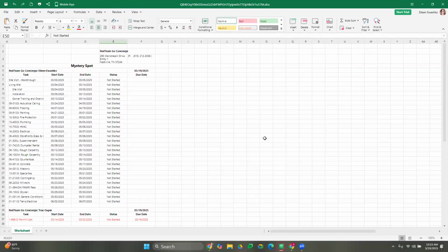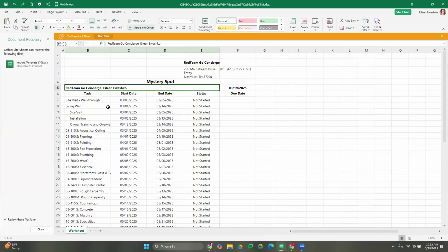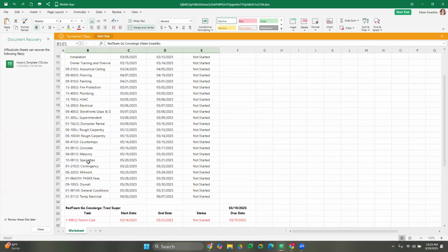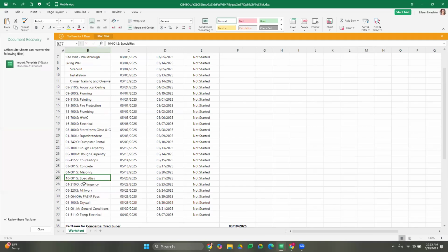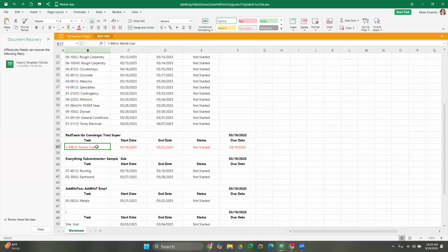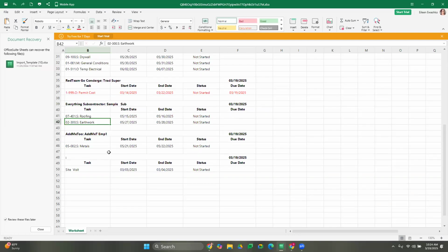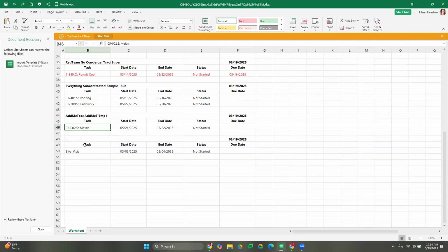So here's this report. Right now, here's everything so far, because I've just created my schedule, everything that's assigned to me. You can see we have some blanks in here, so I don't have those subcontract agreements signed yet. Then if we scroll down, you'll see where I assigned applying for permits to Tracy. And then you can see everything subcontractor is responsible for, roofing and earthwork. We're showing their start and end date. If I've given them a due date, that will show up here, just like it does for Tracy and her obtaining the permits. And then you can see the additional tasks. This is add me to, and then this is a custom task that I've added.